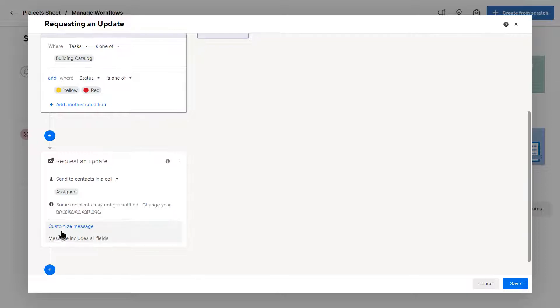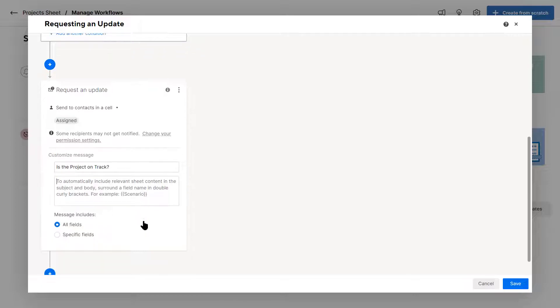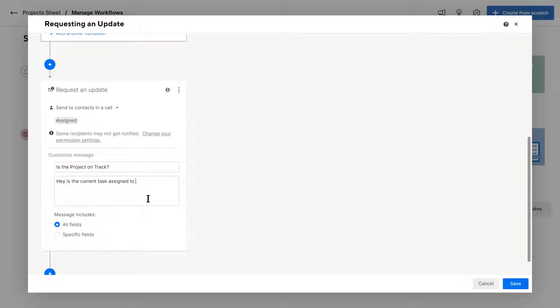So I'm going to customize the message. And in this message, let's say I write is a project on track. And you want to be able to pull in data from the smart sheets. And what you can do is you can say, hey, is a current task assigned to, and you do a double bracket, curly bracket assigned. And this is the column name.